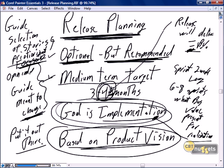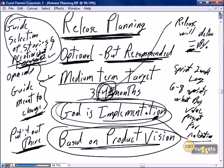There is no direct Scrum artifact related to a release plan, so how do we put it out there? Whatever works for your team — put it on a piece of cardboard and post it in the team workspace, or put it in an email so the team can refer to it on a regular basis. Having the release plan defined and visible is valuable to guide the selection and prioritization of stories and keep the team focused on the end goal.